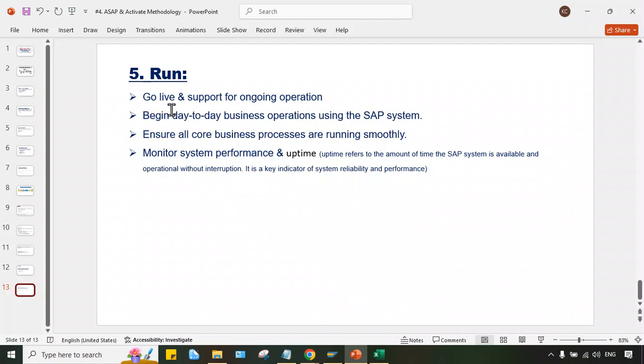Of course, go live is done. After go live, 1 month hypercare will be there, and in that we have to observe these things. And till 1 month, if everything is stable, then fine, the implementation is completed successfully. Now what happened after 1 month? Again they need our support, guys. Our, in the sense, consultant support.